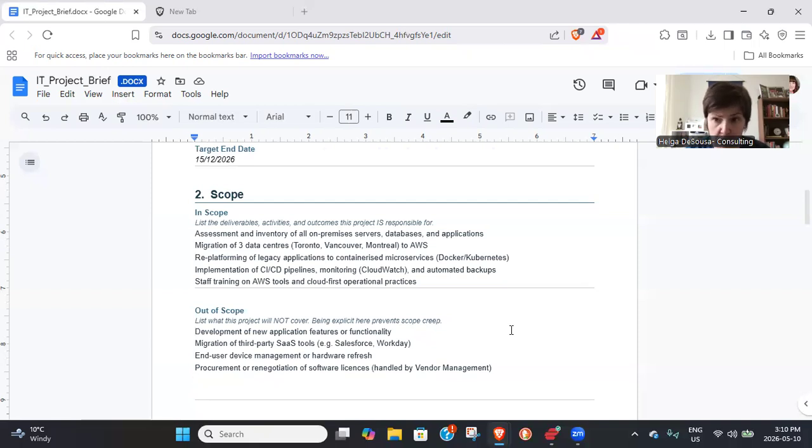And this will help you prevent what we call scope creep, because that happens a lot where there'll be other departments who say, hey, this is kind of like what you're doing. Perhaps we can add this on and do this as well. But if you keep adding scope, naturally you are going to impact your ability to deliver this by December the 15th, whatever the target may be. So as an old senior project manager once told me, what's very important is you guard your border, guard your territory, ensure that you stick to that scope and you defend that scope. Okay.